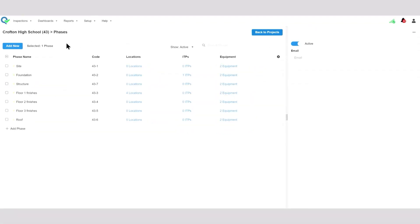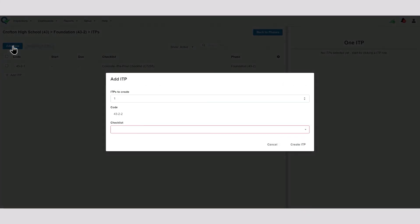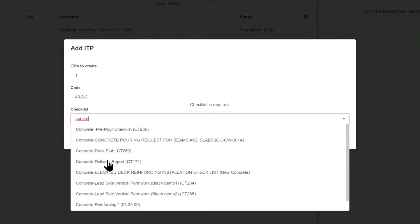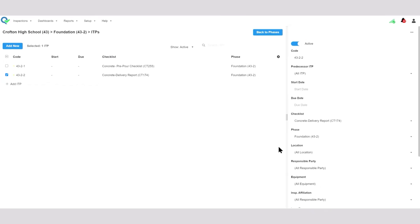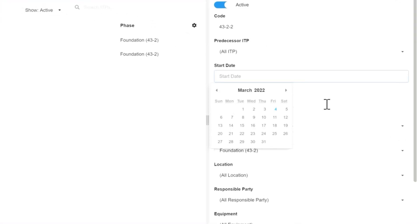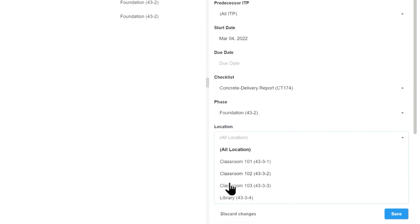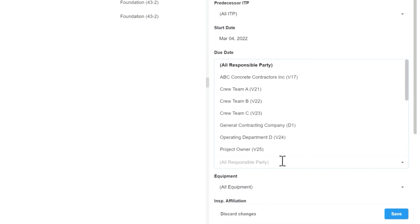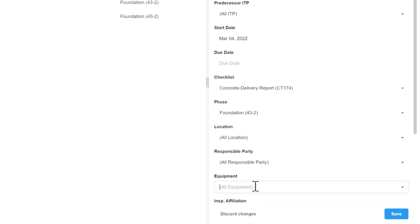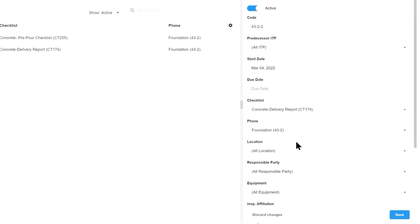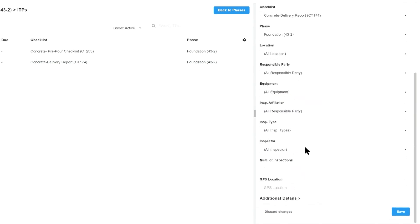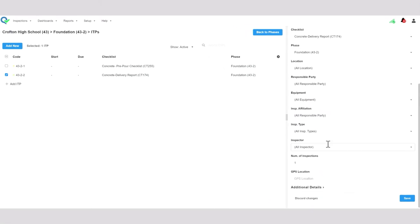Now for a brief overview of how to add Inspection and Test Plans (ITPs). We'll choose a project that has phases, make an ITP for a phase, choose the checklist — and that's really all you need to plan it out. In the right-hand panel there are more details: you can set a start date, choose predecessors, change the checklist, assign it to a specific location, assign a responsible party, and assign it to a specific piece of equipment. There's a lot of detail that can go into fine-tuning the ITP, and we have more information in our help documentation and other videos.